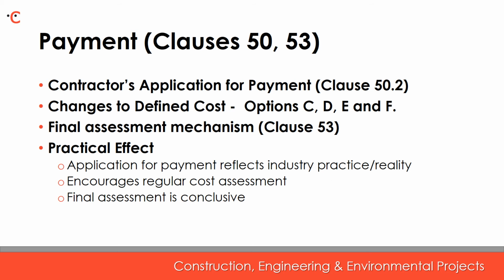The third change is that NEC4 introduces a new final accounts process to reach agreement on final amounts due under the contract. Traditionally, the NEC approach has been that since costs and compensation events are required to be assessed in real time, there was no need for a final accounts process. This new process provides users the benefit of a mechanism that gives finality to costs and avoids subsequent challenges.